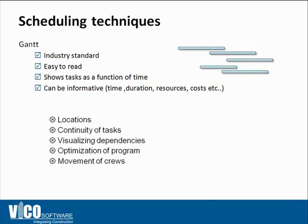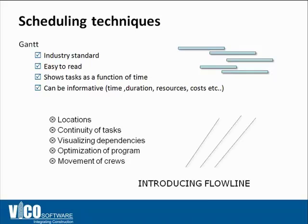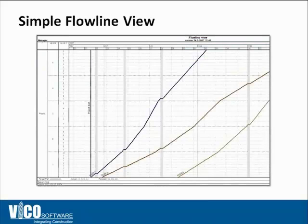Gantt charts don't show locations. They show locations only in the name of the task if you include it, or if you create your own location breakdown structure coding system and include it as a field in your Gantt chart schedule. They don't show continuity of tasks and do not allow you to visualize dependencies and optimize the movement of crews. Using Flowline, however, you'll be able to see all of that in just one single view.